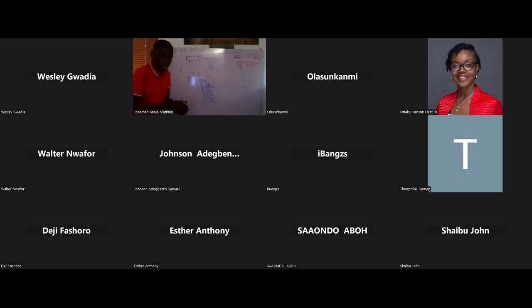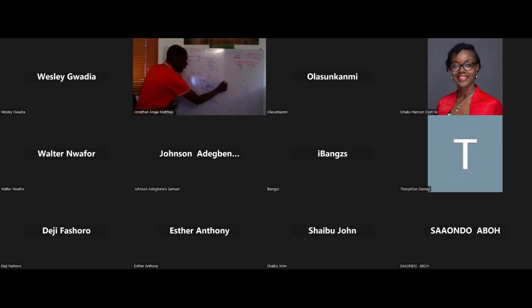So what you will now do is this. You will now carry excavation and say, how much will I spend on excavation? Excavation, the length of the building is 18 meters, times 1,000 naira per meter is 18,000 naira. Concrete footing, let's say it's 5 cubic meters times, let's say 8,000 per cubic meter. You say it's 40,000. This is bottom up.